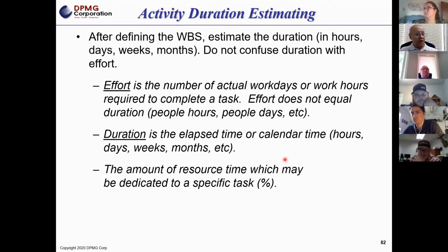If you assign her a task that's going to take 20 hours, how long is it going to take to complete? How much duration? 5 days. You would assume 20 hours, well, she can get that done in 3 days, it's 24 hours' worth of work, but it's a 5-day duration. You really need to understand the availability of the resources, because that's how planning gets out of whack. People assume they're 8-hour days, it's 20 hours' worth of work, we should have it done in 3 days.